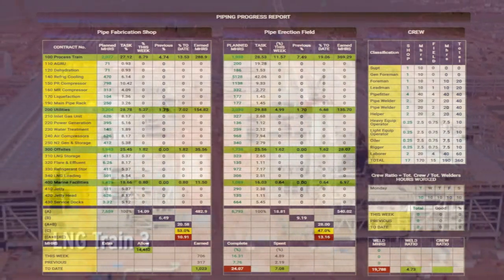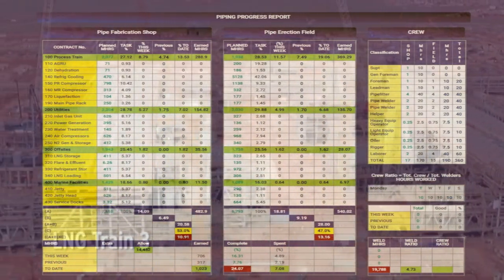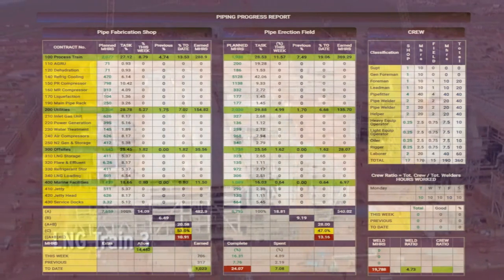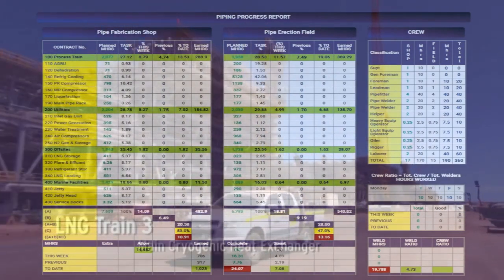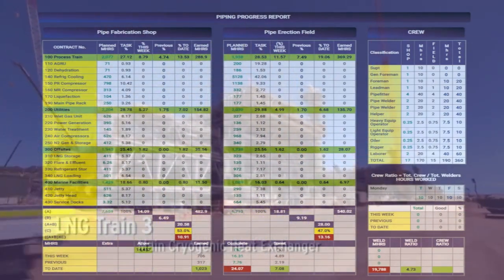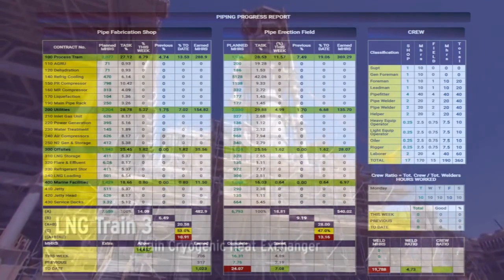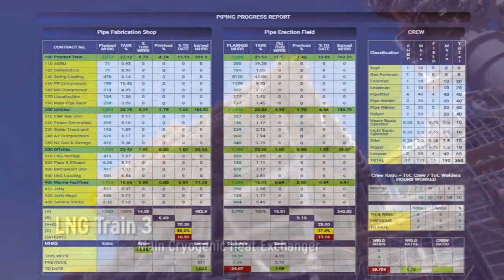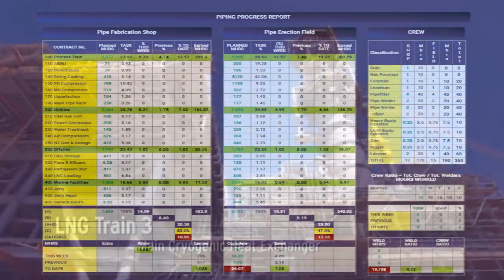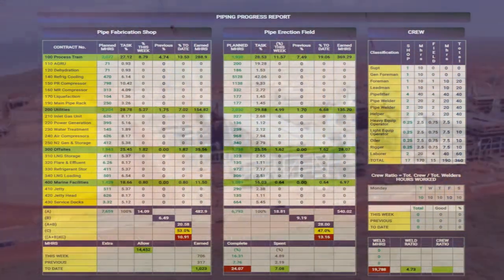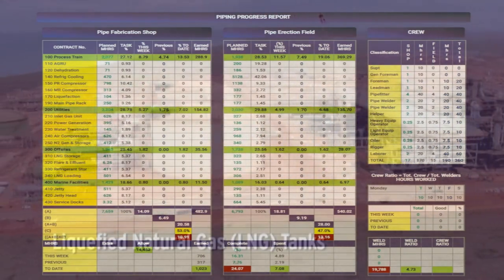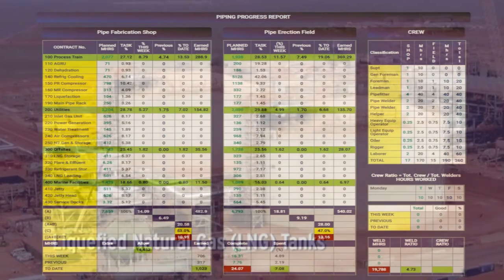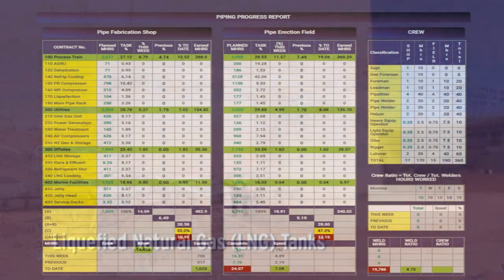As it was stated, the purpose of this piping progress report is to provide an evaluation of construction performance with respect to work hours, allowing the user to identify areas of potential concern which would require further analysis. This report is structured by project, area unit, and cost code. This report includes 5 sections: report input data, report results, crew report, non-productive hours tracking, and progress planning.